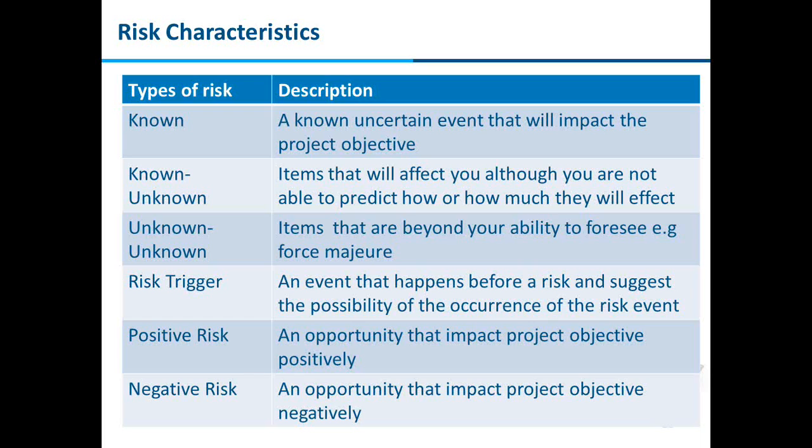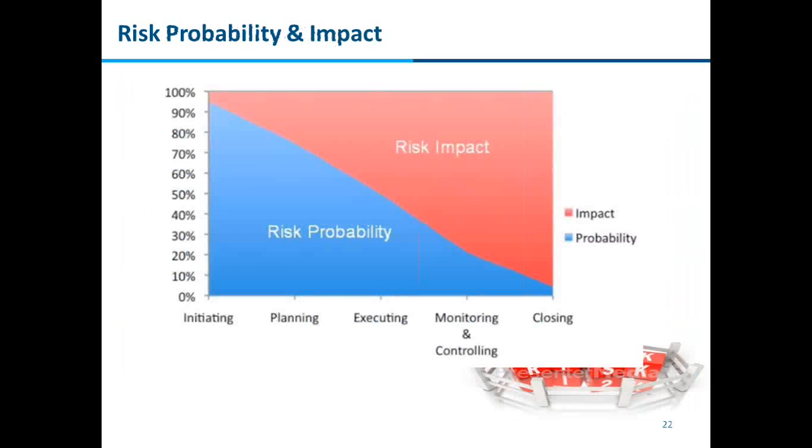There were certain things which were beyond our control, and the procurement order placement of the network component got delayed, which aligned with the time of the server component. So we took this opportunity and availed that 50% discount, even though there was an overall impact on the project. But that's part of the project. Talking about negative risk, I believe everybody is aware what negative risk is all about.